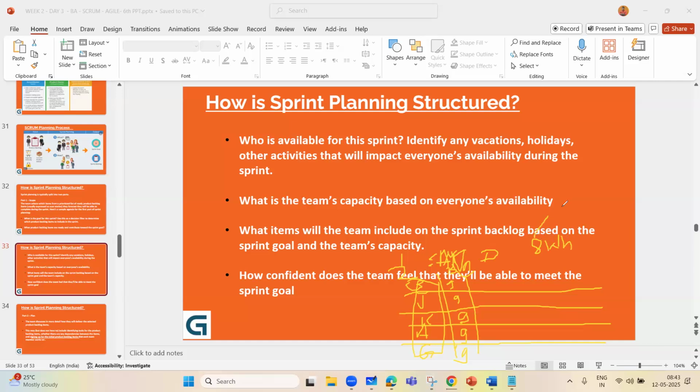Say for example, in 8 hours, consider some meetings, unplanned meetings, or some events or ceremonies coming up. It means that 2 hours are gone for those meetings. 8 minus 2 becomes 6, right? And from those 6, you go ahead, take a bio break or something like that, or you help some other people, so actually how many hours are you going to work?